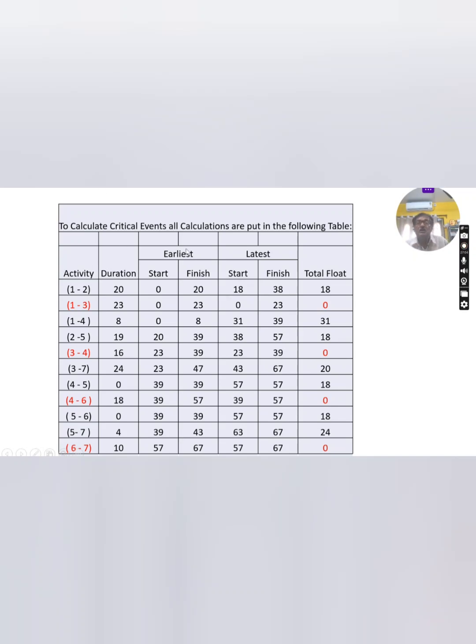Now you have to compute the earliest finish time. If you know the earliest start time, you just add the activity duration or task duration, and then you will get the finish time. You can check for any one. The earliest start time is 20, add the duration for this activity, and you get 39. In this way, for 4-6, the earliest start time 39 plus 18 is 57. Last one, 57 is the earliest start time and the activity time is 10, so the earliest finish time is 67.